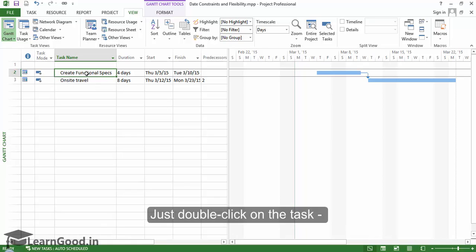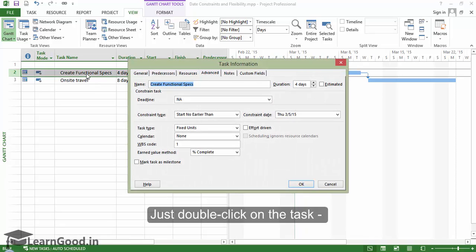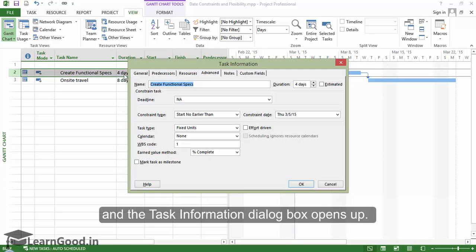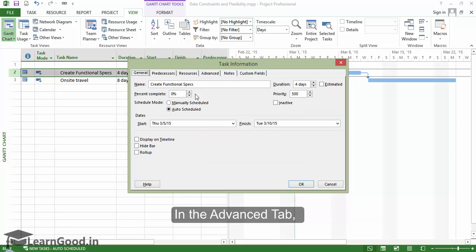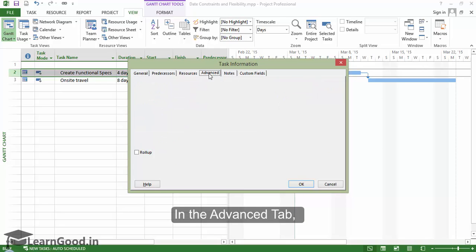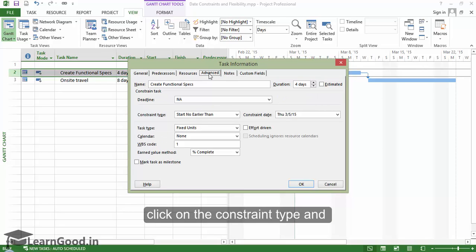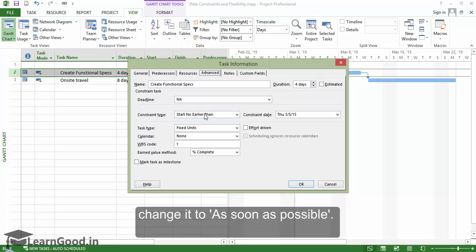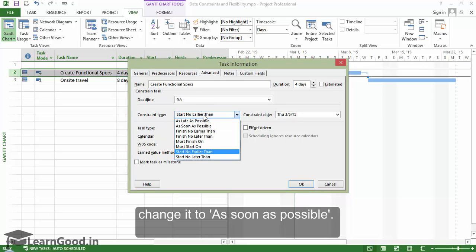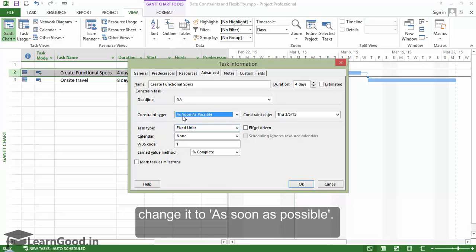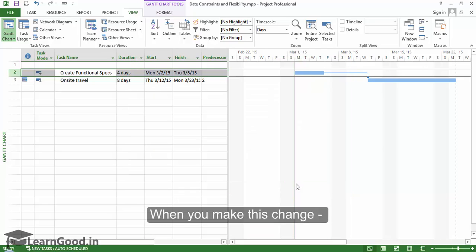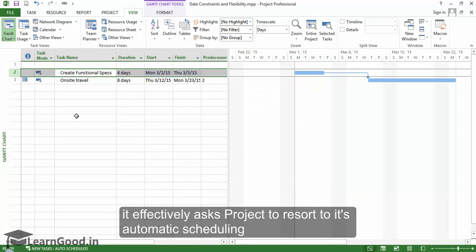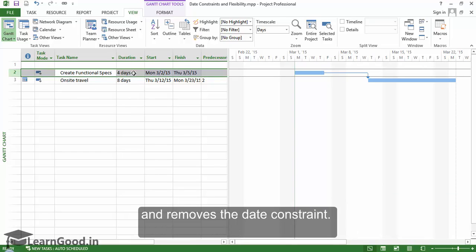Just double click on the task and the task information dialog box opens up. In the advanced tab, click on the constraint type and change it to as soon as possible. When you make this change, it effectively asks Project to resolve to its automatic scheduling and removes the date constraint.